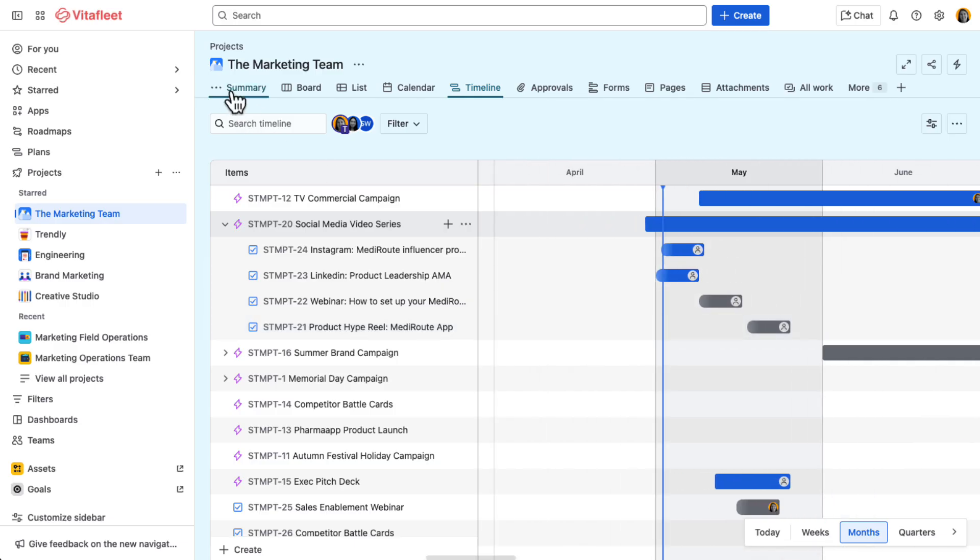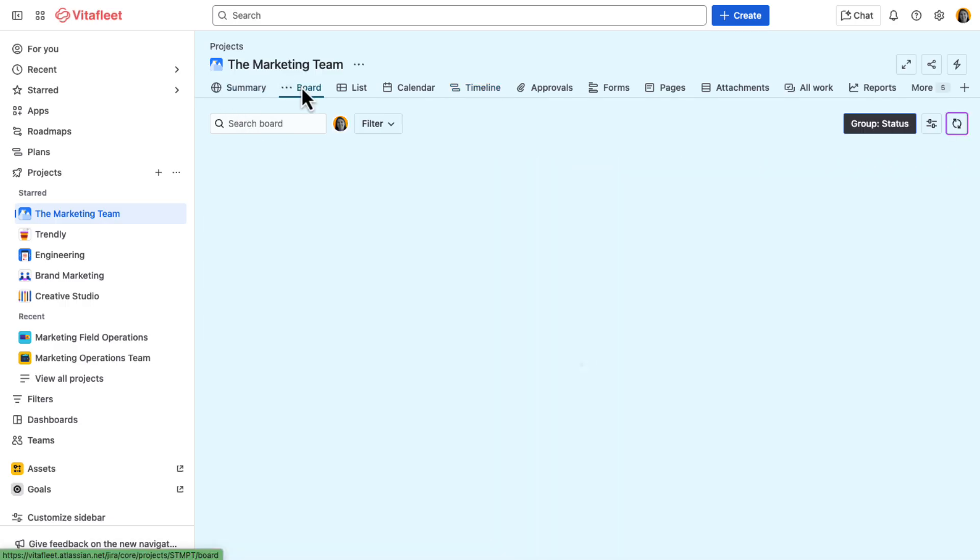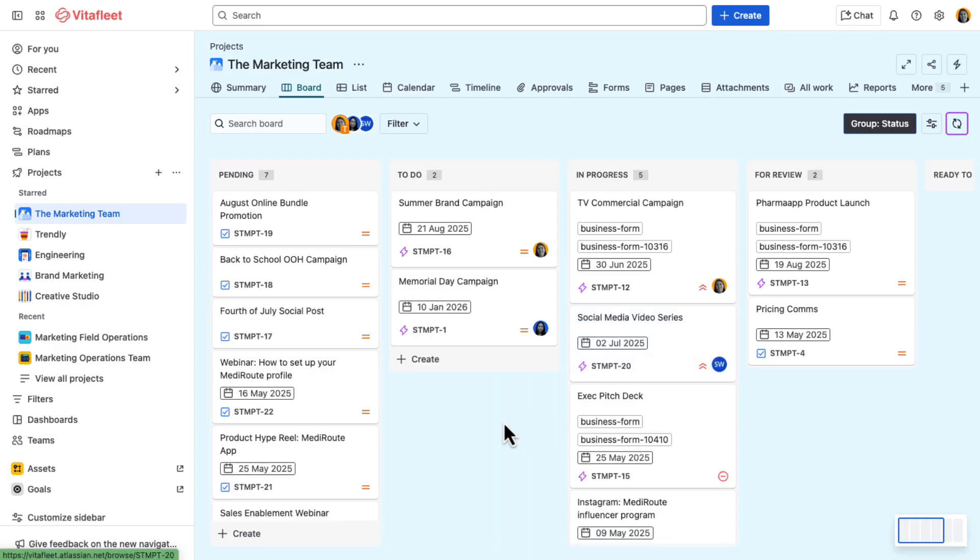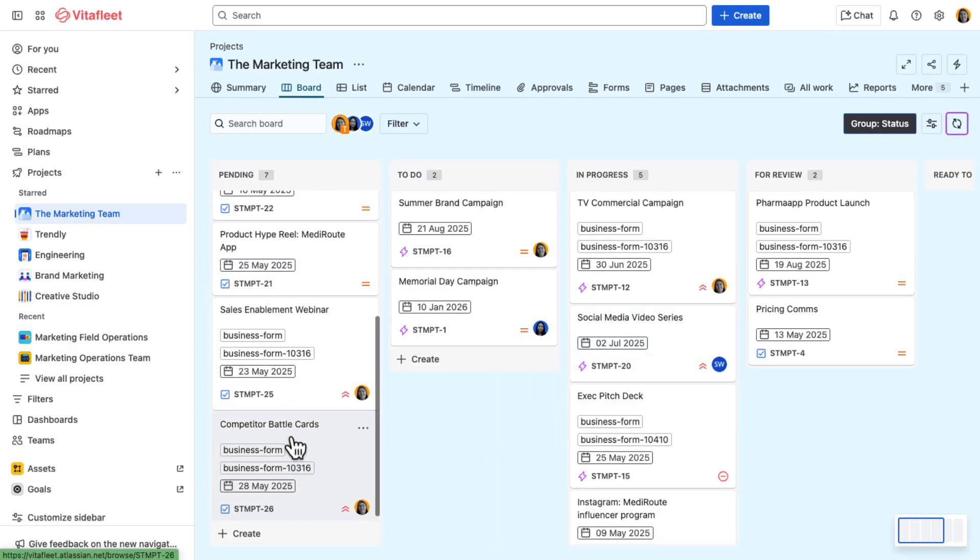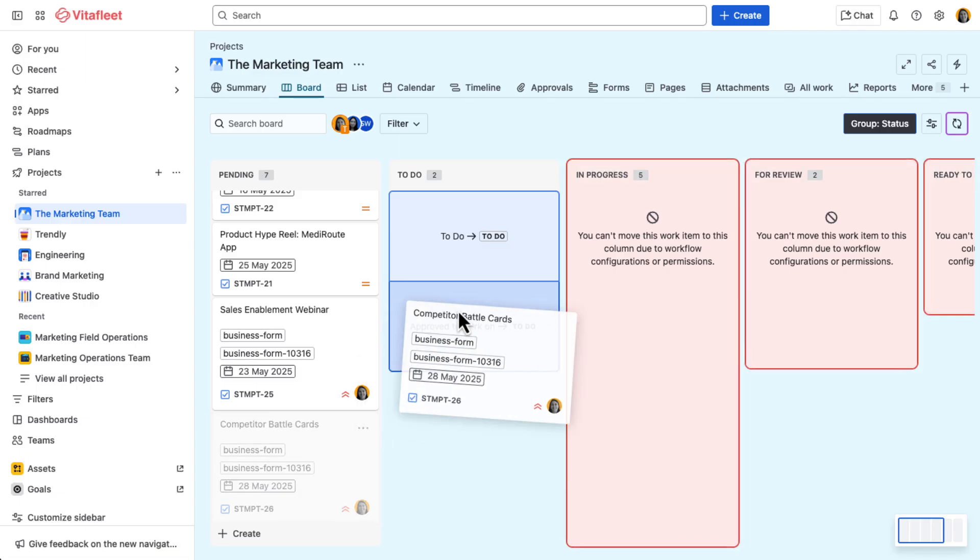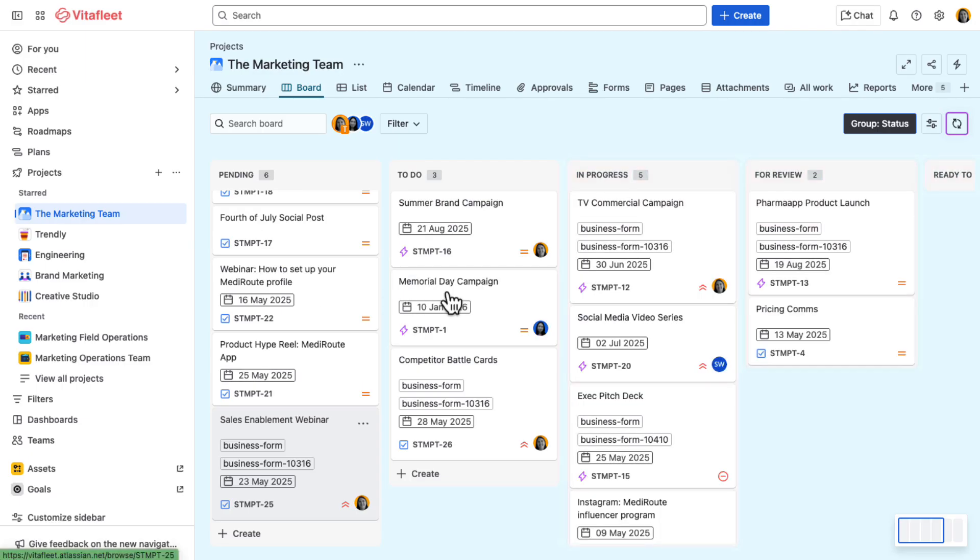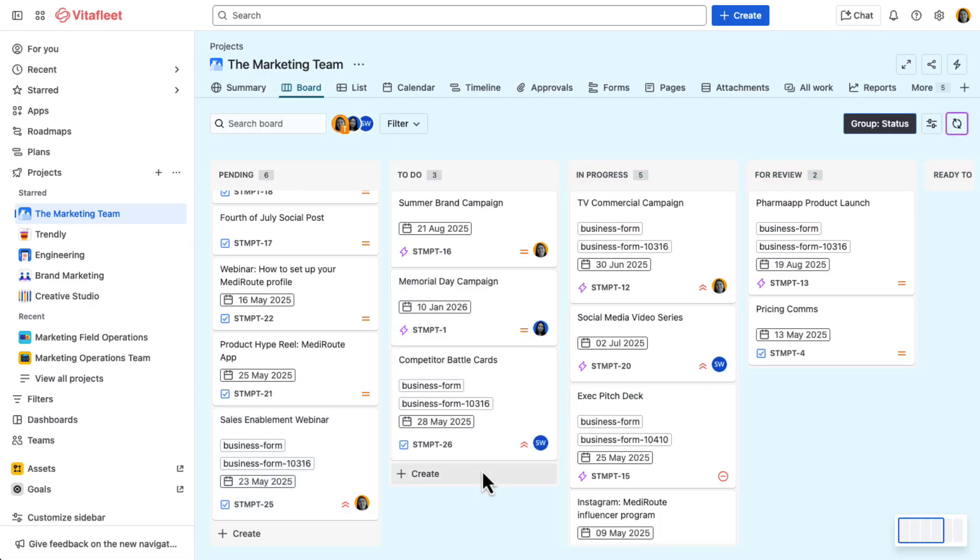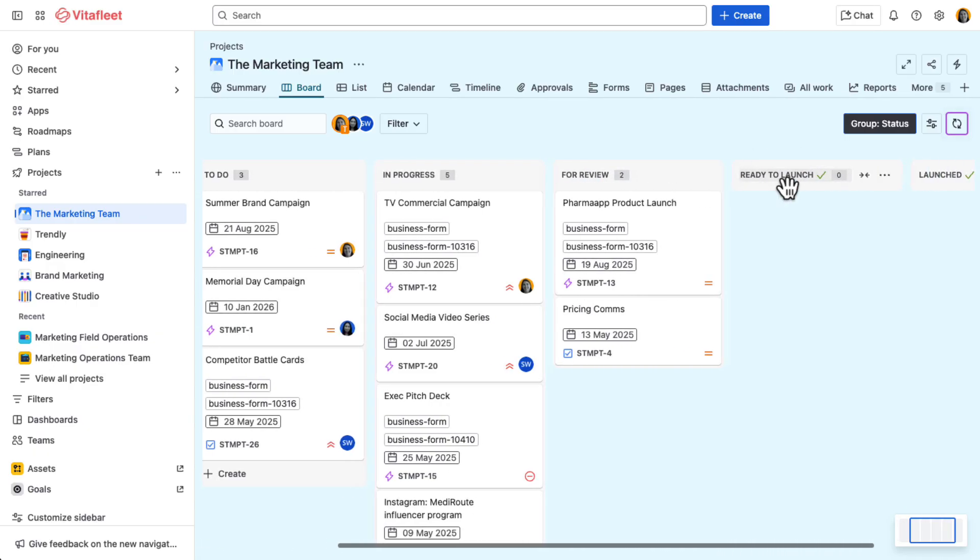Once the request is reviewed and approved, Tracy moves it to do. From there, the work will follow the marketing team's custom workflow, which includes stages like review, ready to launch, and launched.